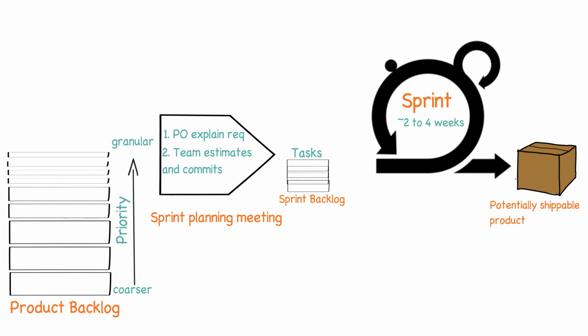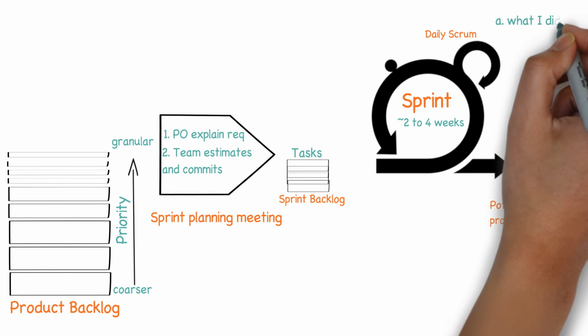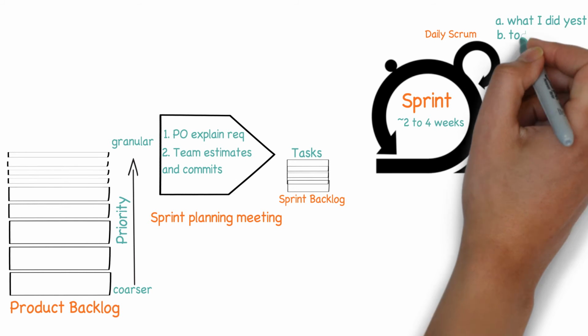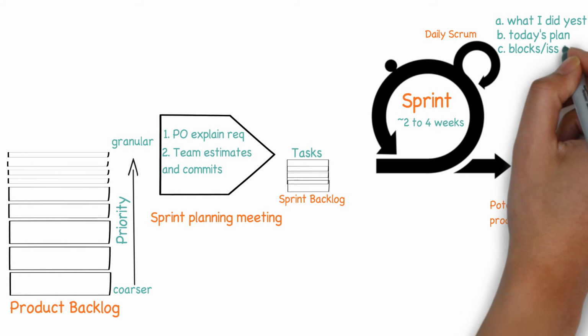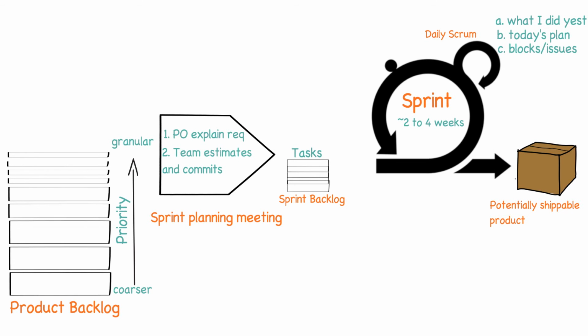During the sprint, the team does a daily Scrum meeting where everyone in the team meets every day at the same location at the same time. In this meeting, each of the team members appraise the rest of them on what they did yesterday, what they are planning to do today, and whether they are facing any issues. The intention is to appraise everyone on what's happening and bring in accountability. Typically, the stand-up meeting should not exceed 15 minutes.